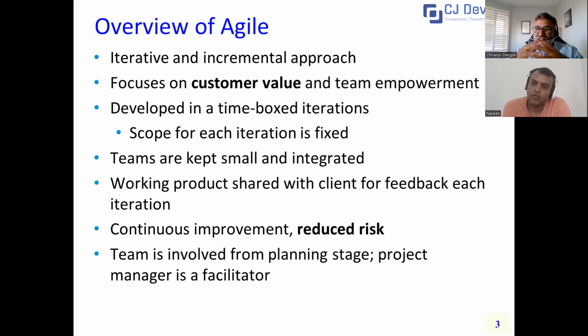So it is a collaboration between developers and the product owner, not owners, but owner. Normally, I prefer accountability to rest with one person, not with multiple people. So that is how the stories are decided to be taken up in the sprint, making sure that there is no dependency.